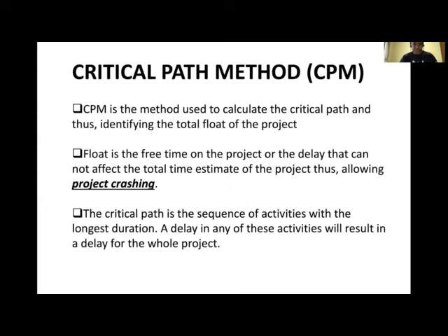All right. So now moving on, the critical path basically is a sequence of activities with the longest duration. A delay in any of these activities will result in a delay for the whole project.